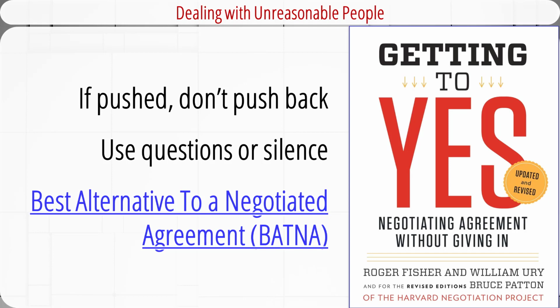If you are negotiating price and delivery dates and can choose from a number of reputable suppliers, then you have a strong BATNA. If, on the other hand, there is only one vendor who can supply you with specific critical material on time, then you have a weak BATNA. Watch this video to learn more about BATNA.